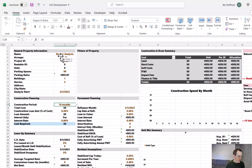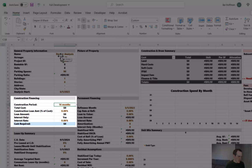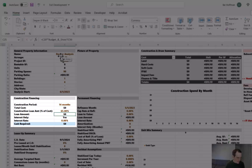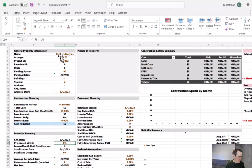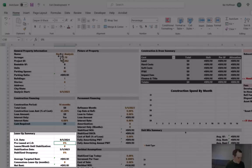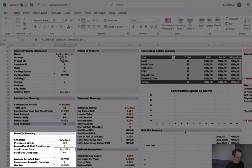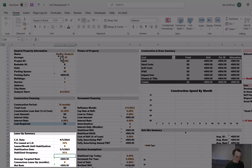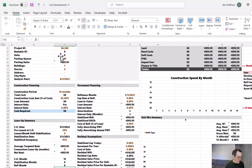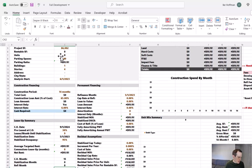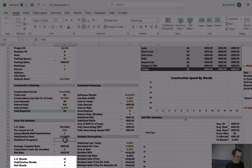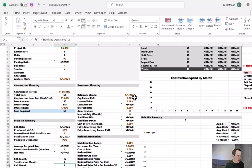For our construction financing assumptions, 14 months is actually correct. That's how long we're assuming the construction period will take. We're going to get a 65% construction loan with a 6% interest rate. And let's make some pre-leasing assumptions. I'm going to assume that once construction's complete and residents are able to move in, we're going to be 30% pre-leased. So that's about 26 out of the 88 units will be leased before we even open the doors. And then from there, we'll lease about nine a month. Our stabilized occupancy will specify as 95%. This is what would trigger the refinance. And we think our rents are accurately priced. We've done research. We're conservative. So we're not going to plan on giving away any concessions during the lease up. And once we fill out the model a little further, there'll be a nice summary here of when the property gets the certificate of occupancy, when the property stabilizes, and what month the refi will take place.